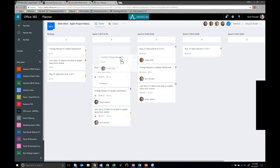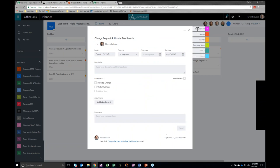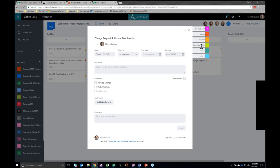You can simply drag a task to whatever sprint you want to put it in. This is how we would do our sprint planning — just drag and drop, choosing what sprint items need to go into. You'll notice a very small flag next to each task that has a color. If you hover over it, it tells you different skill sets. For example, this is a testing task, and this one here is a development task. Those are flags that I created, and they're very easy to create. Any task that you have open, if you hover over it, you'll get all your flags — you have up to six to use — and you can give them a label and identify one or more of those flags to your tasks.